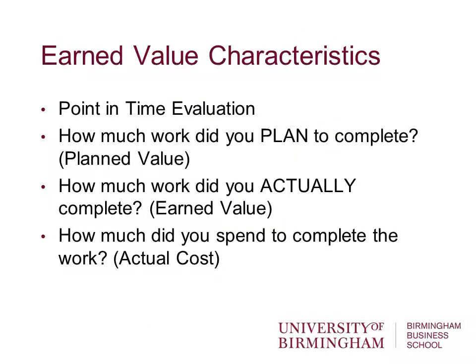So let's think a bit about earned value. It's a point-in-time evaluation. These are often carried out on a regular basis, maybe weekly or monthly. We look at how much work we plan to complete, which is the plan value. We look at how much work has actually been completed, which is the earned value. And we look at how much we spent, which is the actual cost.